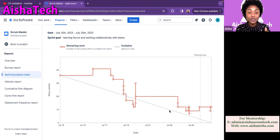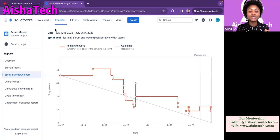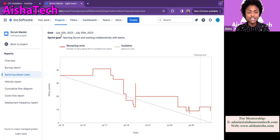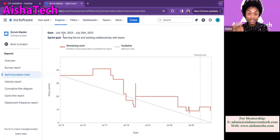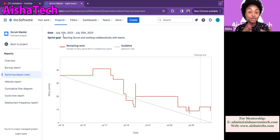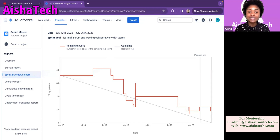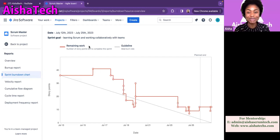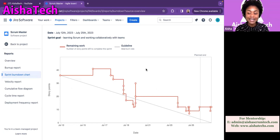At the top right here, it tells you the date range. This sprint was from July 12th to July 25th — that's the length of this sprint, and it tells you this is a two-week sprint, not a five-day sprint. The next thing you look at is the goal. They have a goal — this is a good team. At least they are already writing their sprint goals, because we all know some teams don't. Then you look at the red guided line.